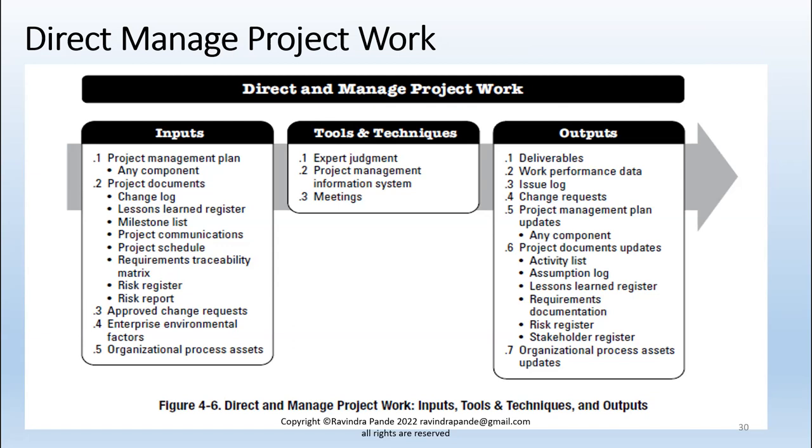The Change Control Board has a good analysis team that analyzes the change for schedule, cost, and other variances, so that if we include those changes in our current sprint, the next sprint, or the sprint after that, it's possible to get them created, executed, and built, depending upon the change control thought process or the way the business analyst plans it for us.